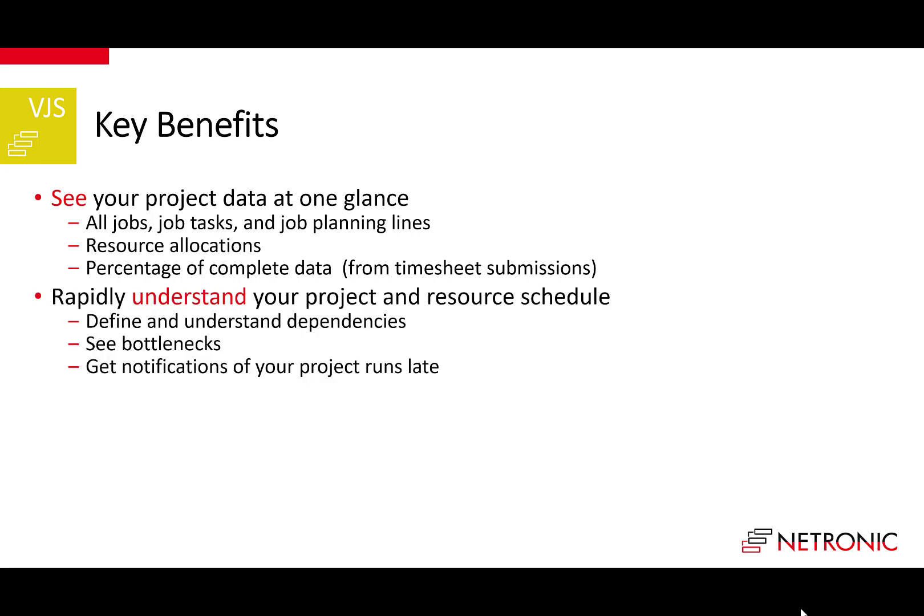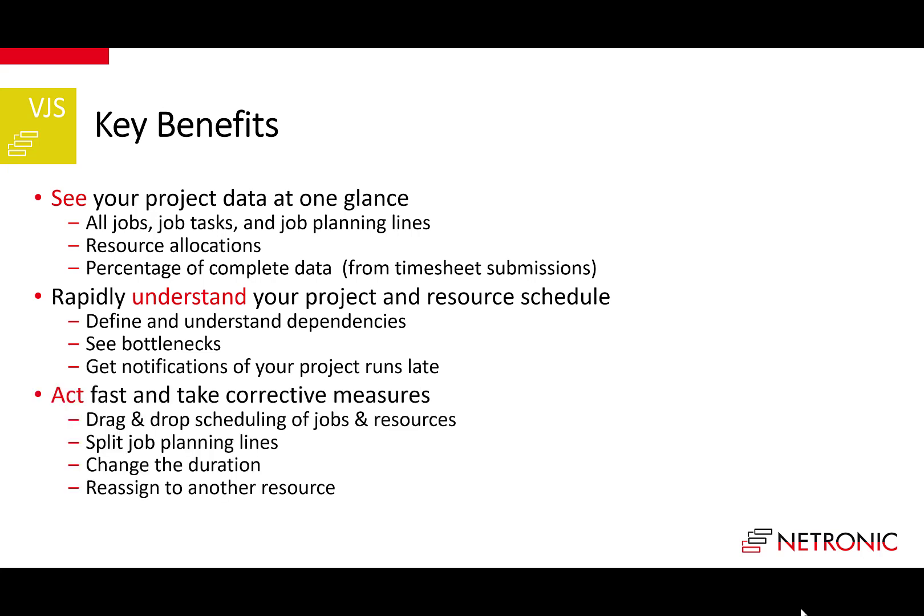Second, as you see data, you faster and more easily understand your project and resource schedule. With the VJS, you can define and manage dependencies, understand where your bottlenecks are, and get notified if projects run late. This allows you to act fast and take corrective measures immediately. This is supported by drag and drop scheduling, splitting job planning lines, reassigning tasks from one resource to another, and so on.